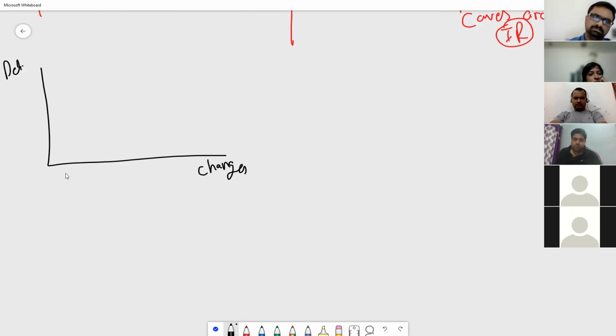If you have a single delivery and there are no changes, then we use the predictive life cycle. If there are multiple deliveries but no changes, we use incremental.